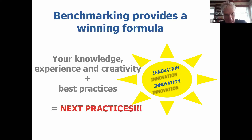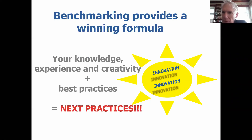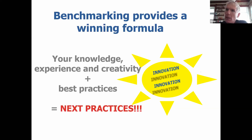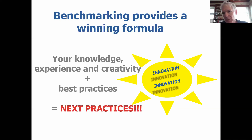It gives you new concepts and new ideas, whether or not you're going to replicate what another organisation does. Normally in a benchmarking project you would expect to get between 50 to maybe 120 great ideas and best practices, and then it's a matter of sifting through them and prioritising which ones you're going to implement. This is where you get fast change, quick wins, and breakthrough changes.